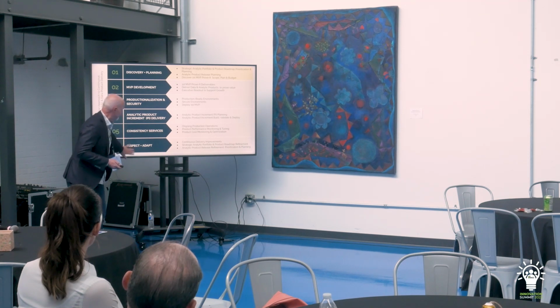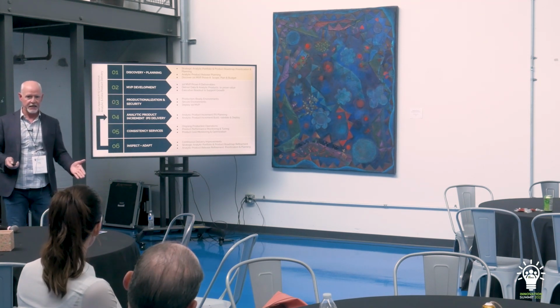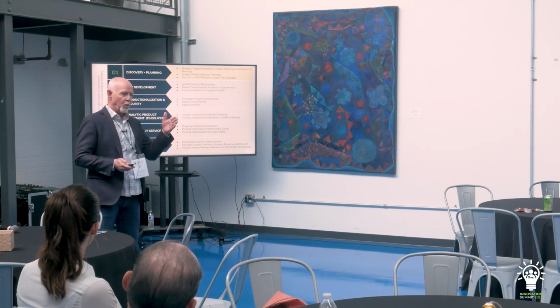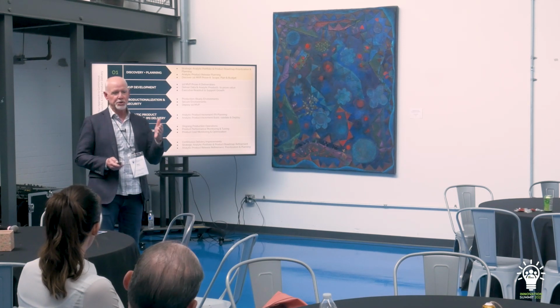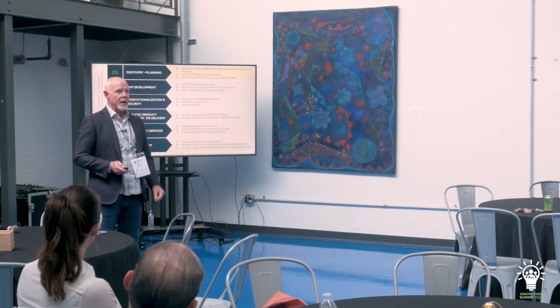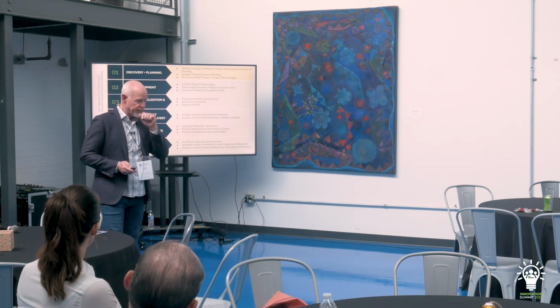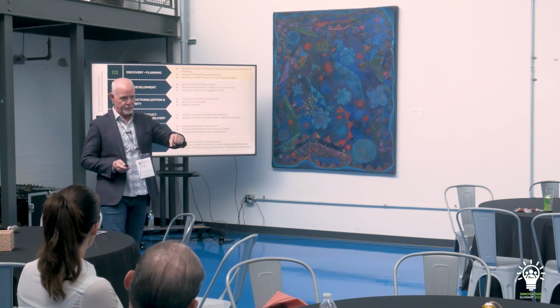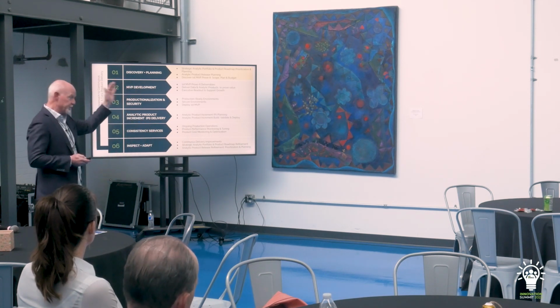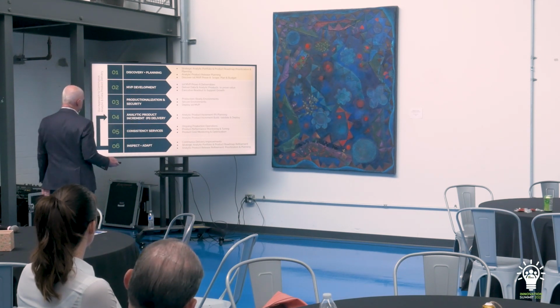This last phase here, inspect and adapt, again, a lean thing. At the end of every body of work, you do a very deliberate, what should we stop doing that is not value added? What should we start doing that we haven't been? And what should we stay the course on? And the things that we say that we should change, those become stories that are added into the next product release because we're going to implement process improvement along with any product release, which goes to the continuous learning discipline, okay?